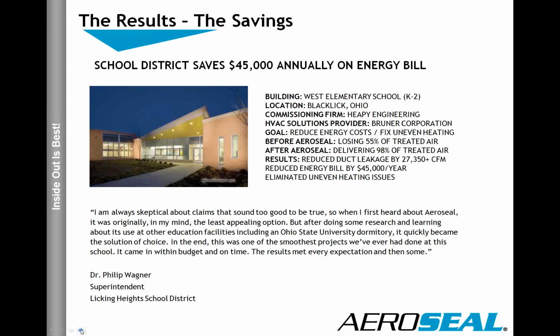Next slide, please. So when you looked at all this, what it really came down to is that we reduced their annual energy bill by $45,000. We were able to minimize the loss of airflow in the system. They were losing, we calculated and verified, duct leakage in excess of 27,000 CFM. Now, the duct leakage is less than 2,000 CFM, and 98% of the air is actually ending up in the classroom space. The quote that you see there on the screen, Dr. Wagner, who's the superintendent for the school district, was very skeptical about using Aerosol.